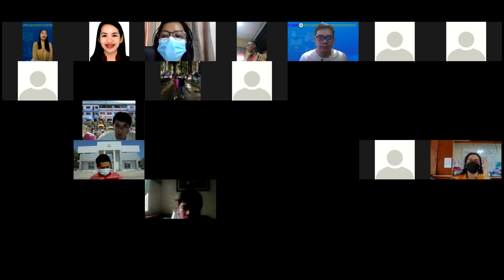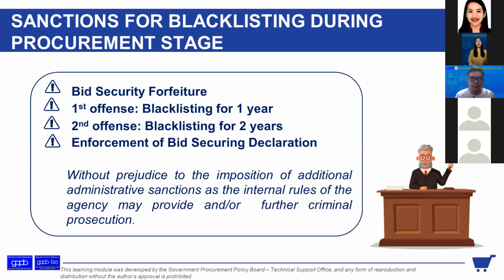So, next. What is the procedure for blacklisting during procurement stage? So, who may initiate? Careful tayo. Who may initiate? Any bidder or prospective bidder. Siyempre, sila yung aggrieved eh. Diba? Sila yung feeling nila na lugi sila. Then, be careful with this: duly authorized observer. If your observer can find something na pwedeng ma-blacklist.